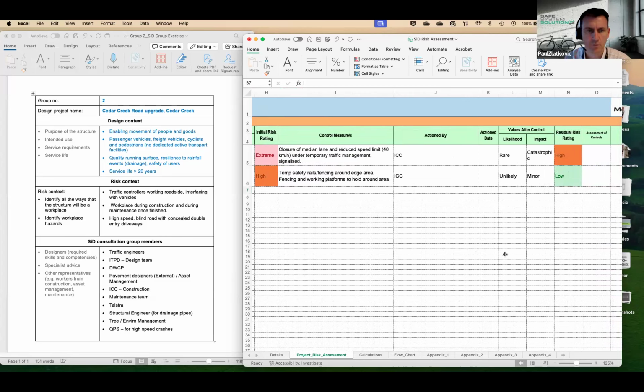Yes, thank you for that. And I think this road is a one-way in, one-way out road, so Josh might be able to confirm that. In terms of your control measure around vehicle impacts to workers, it's not reasonably practical to fully close that road and eliminate that risk, because people need to access their homes and be able to access the outside world as well.